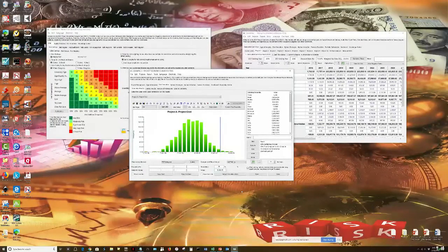But guess what? 99% of the time, you will not exceed 8.5 million. So you need that additional $500,000 as buffer. To say only a 1% probability, extreme outlier, extreme situation or scenario that you will have anything above that $8.5 million. So that provides you a buffer, provides you a quantitative way of measuring, in this case, the project.